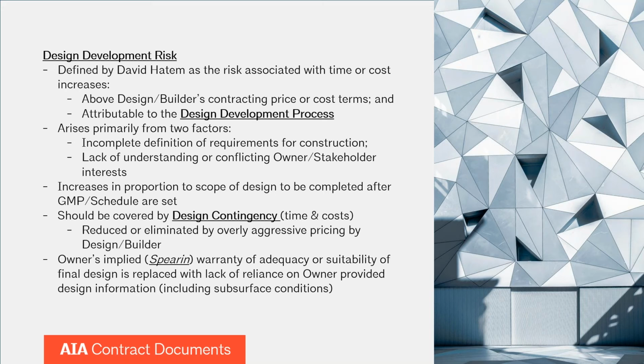And oftentimes we don't pay attention to what the teaming agreement says, or we as architects and engineers have not really made use of qualifications or clarifications to the extent that trade subcontractors have. And I tell our team at HOK, we need to start thinking like trade subcontractors. We need to issue qualifications, and the design build agreements are really important terms that must be negotiated and really survive completion or termination of that teaming agreement.